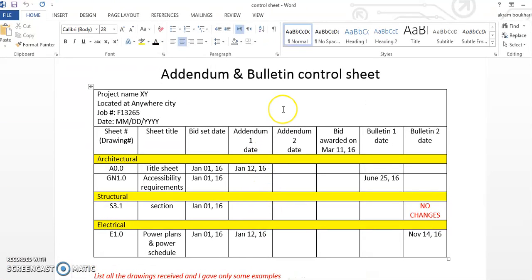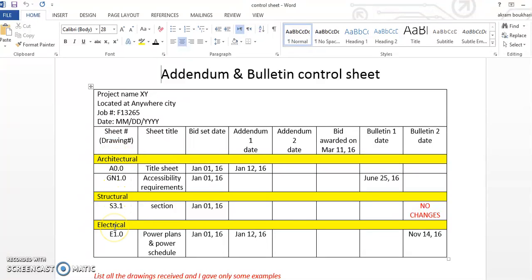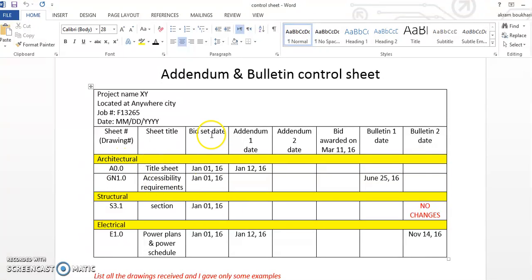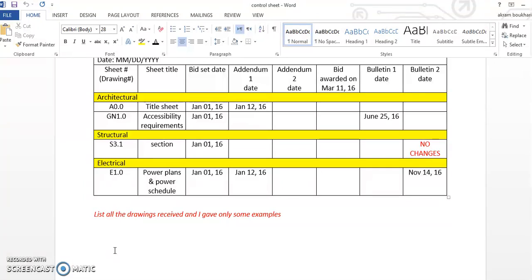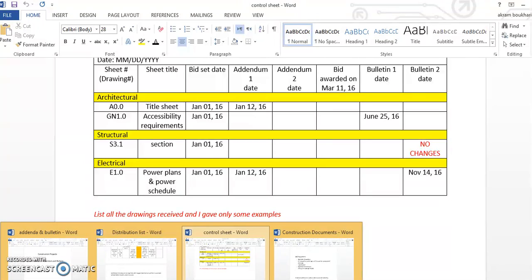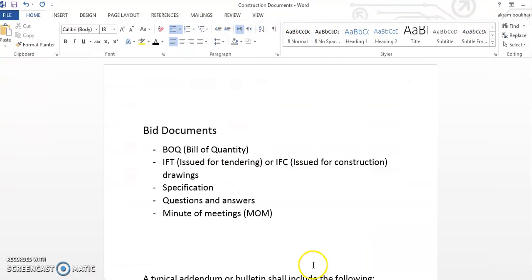Distribution list helps you to keep a track of who has got what from you, and this is extremely valuable when disputes arise in a project, and disputes always arise in a project whether you like it or not. In the same token, we also have a control sheet. The control sheet is similar to something like this. Here we list all the plans or the drawings, and I have included some examples only. It shows the section, architect, the title, what the sheet is, bid set date given on this date, addendum was given on this date, and so on.